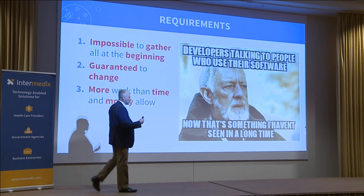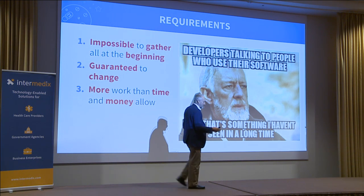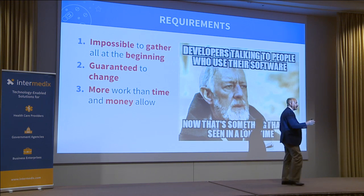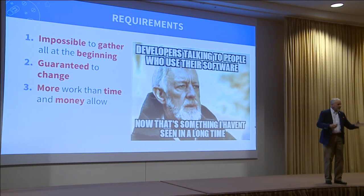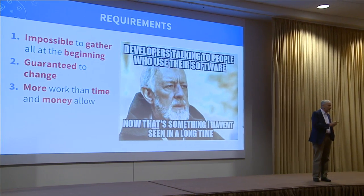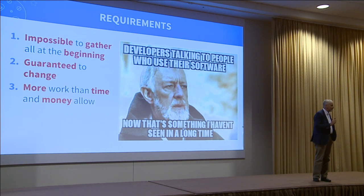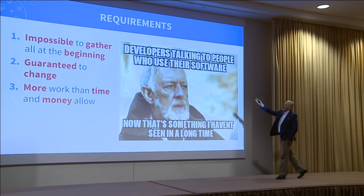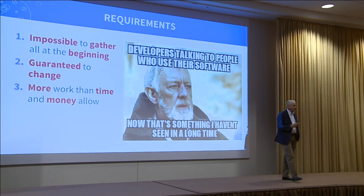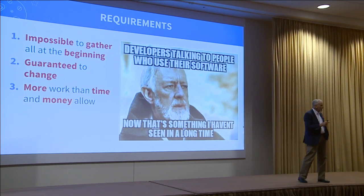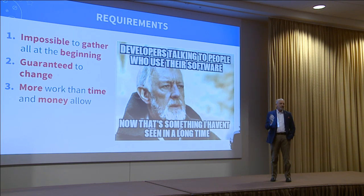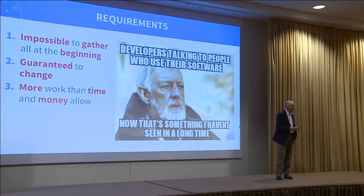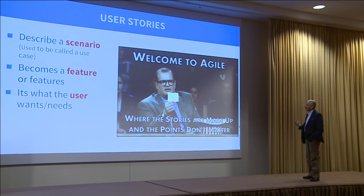Requirements will always be incorrect. Agile gives us a way to mitigate the risk of building the wrong thing — running down and doing something for nine months and going, oh well, that airplane needs two wings instead of one. It's impossible to get them all right at the beginning. They will change during the process, and there will be more requirements than time and money can deliver. You get the business to choose how they want to spend their money.